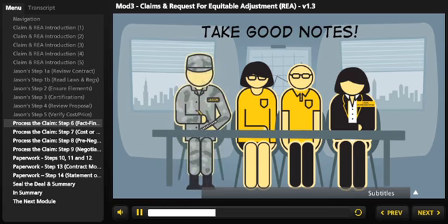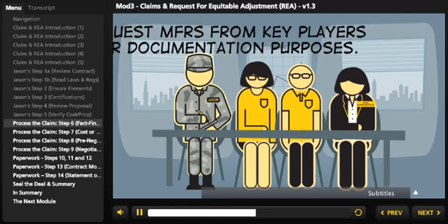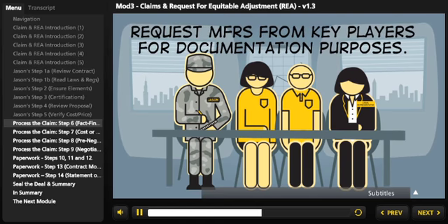As the fact-finding session continues, Jason keeps good notes, which he will later use to compose a memorandum for record about the relevant details leading to the claim and to compose a determinations and findings justifying any contract actions he may take. He also asks the technical users and the contracting officer representative to send him their perspectives about the events that occurred which resulted in the claim.